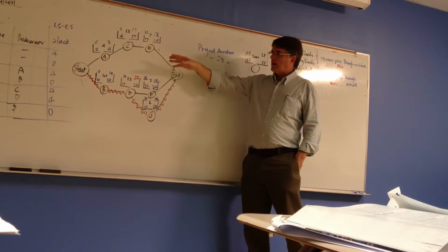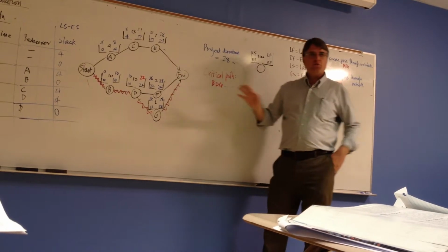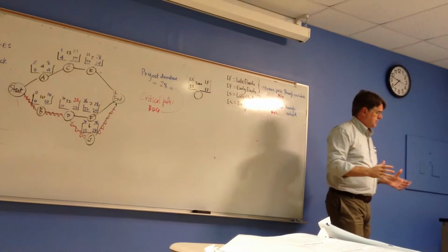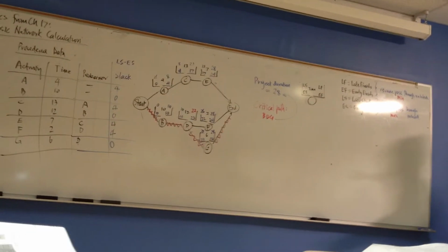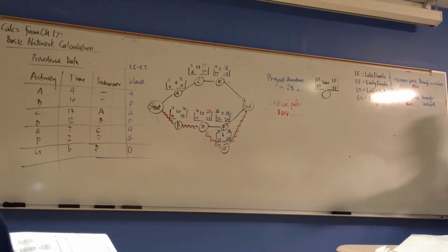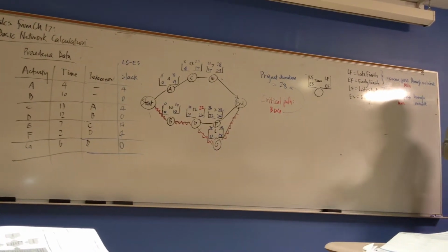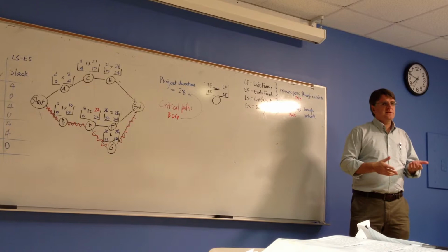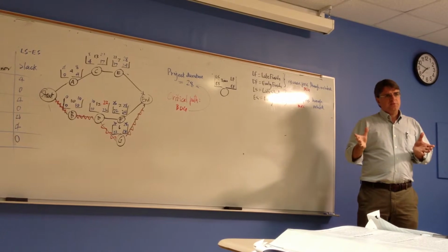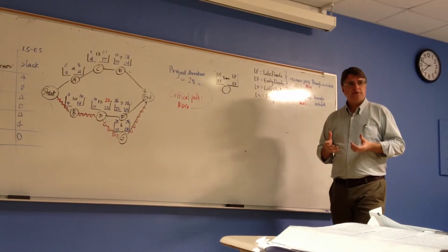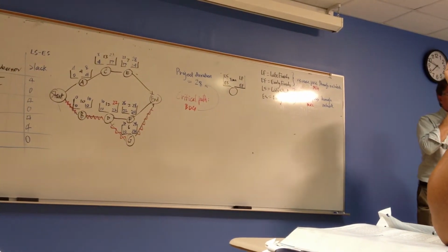But if I did want to let them drag a little bit, take a 4-day vacation, then get started, I'd still be okay without it impacting the overall duration of the project. The overall duration of the project, again, is key because you want to get done. You might have taken a site insurance policy that ends on a certain day. You don't want to come back and have to reinsure for a week or something. It gets expensive. Your rentals for the site office, the site truck, some of the cranes and all this good stuff would have been set up for the duration of the project. So you don't want to have to renegotiate that stuff. Also, you may be paying a penalty if you did agree to some contractual penalty for a time overrun.